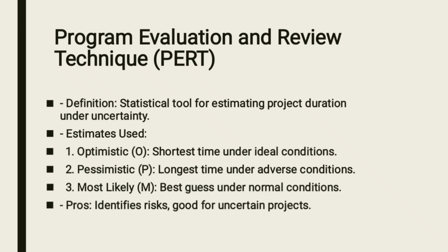There are some pros, advantages, in Program Evaluation and Review Technique. Number one, it identifies tasks and identifies risks. As you are trying to understand optimistic time, pessimistic time, as well as most likely time, within the process of doing that, you are able to identify risks associated with your project. Another one, it is best for those projects which are uncertain, where you're not so sure about the time they are going to take. So this one is the best.